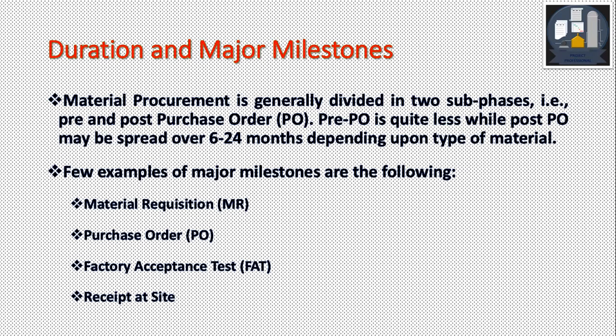There are some long lead items which go up to 24 months. There are some things like pipes which take less time, especially the normal type of pipes.